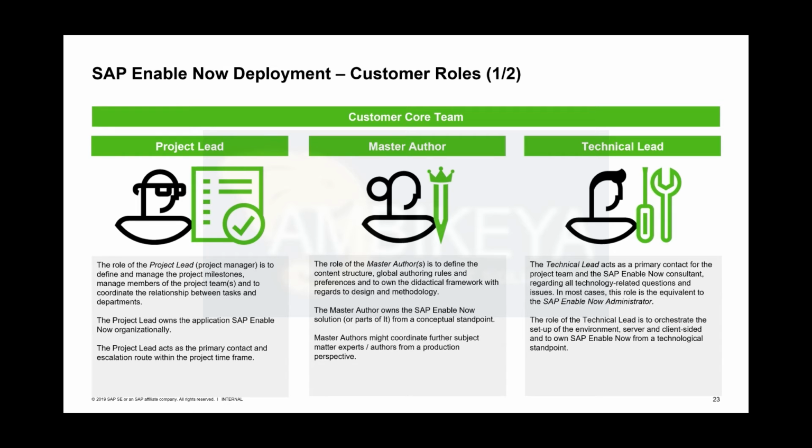We come in as consultants, and there's this one guy in IT, thinking in IT terms: I have to implement a piece of software together with you guys. But they had no clue that there are people needed to create content and maintain content, that the subject matter experts have to be taken into consideration, that they have to be trained as well. All this needs a proper lead.